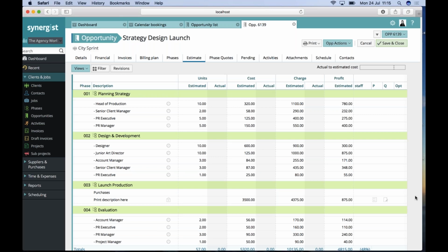Now, if you're doing that within your estimate and not your quote, what happens is that scheduling tool is inaccurate because you'll actually be scheduling less hours than is needed. Even if you're charging 10 hours, that, say, designer, for example, still needs 20 hours. Okay, and also you still need to see in your capacity plans that we need 20 hours of a designer. So that's one of the reasons in which we have a separate estimate to the quote. Hope that all makes perfect sense.